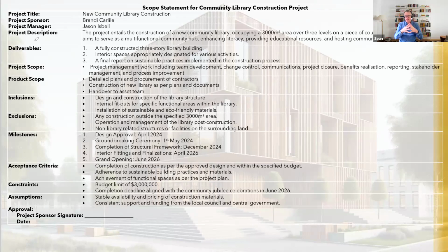Millions of dollars traded hands each month, and there were all these defined IT processes for how these work orders would be generated, approved, signed off, paid, receipted, all of those things. And I do remember being in this meeting, and the BA that was with me pulled out a large A3 printout of the process and said, right, this is what we're here to talk about, and put it down. And the other BA gave that sort of sound and said, oh, look, you're on version 2. We're already on version 3, and pulled out their printout, which was version 3.